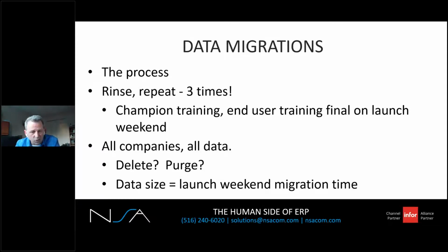I've seen a few instances where there were just monsters in the closet. That's huge tables that had ballooned over the years. You don't know about it in your on-prem environment, but you'll trip across it when you start moving your data. Whether you have API tables communicating with your e-commerce applications that have been ballooning, review and know your table sizes before migrating.